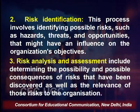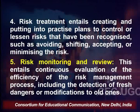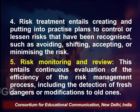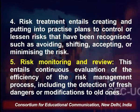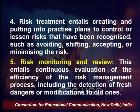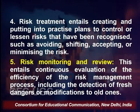Next is risk treatment, which entails creating and putting into practice plans to control or lessen recognized risks, such as avoiding, shifting, accepting, or minimizing the risk. Next is risk monitoring and review, which entails continuous evaluation of the efficiency of the risk management process, including detection of fresh dangers or modifications to existing ones. The integration of risk management into a company's overall management system and decision-making procedures is very crucial, according to ISO 31000. It also emphasizes the need for a structured approach to risk management and the participation and engagement of all stakeholders.